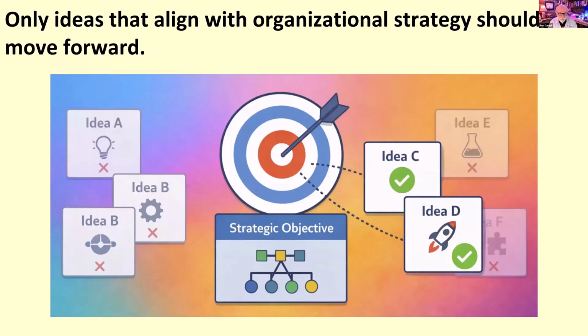So after we have ideation, we can look and see how these ideas that we came up with fit. We screen these for strategic fit. This is kind of an early filter, and we're just looking for alignment here. If the current project or initiative doesn't support our strategic priorities, we shouldn't do anything else to further consume any resources on it. Even if it's technically feasible or interesting, if it doesn't align with organizational goals, it probably shouldn't be done unless it's mandatory.